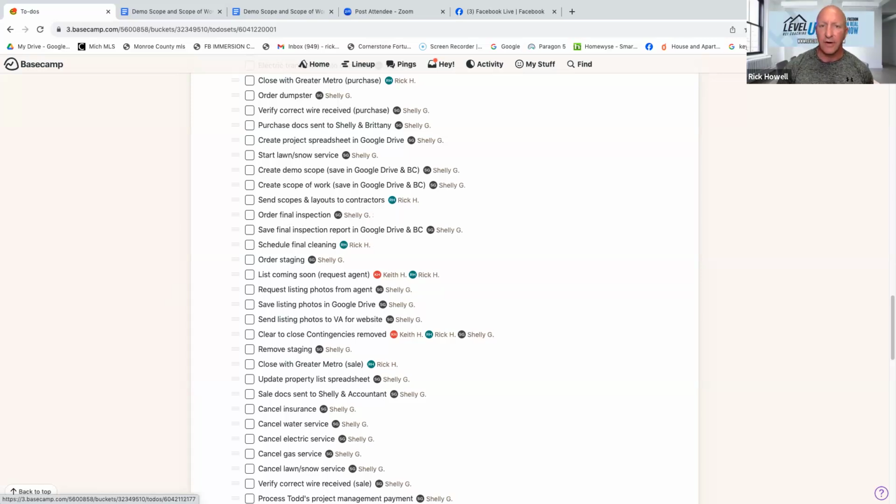So here's another key for you. We do 3 inspections on all of our properties. 3. And here's what I mean by that. Every property that we buy, we'll do a home inspection on the front end, like I said. And then when you get finished, you do another home inspection as if it was never inspected to begin with. The home inspection company comes through and inspects it again.